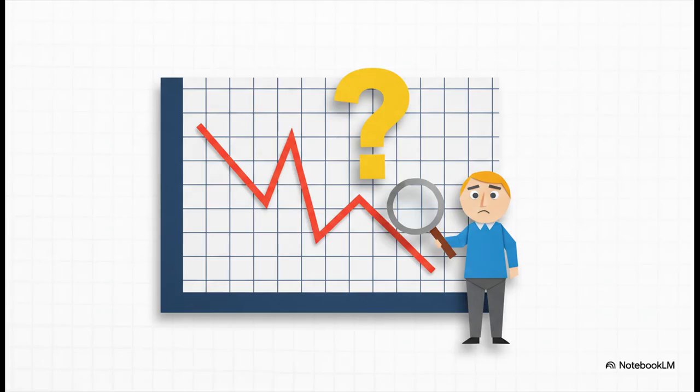Let's make this real with an example. Imagine you're looking at your burndown chart, and on day 7, the line for remaining work suddenly jumps up from 20 points to 25. Now what? The project manager has to go investigate. What happened? The chart just created a question instead of giving you an answer.